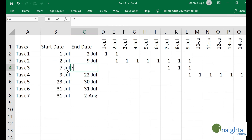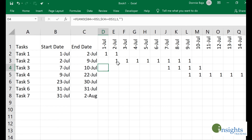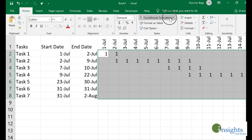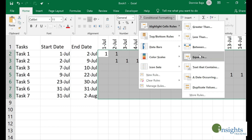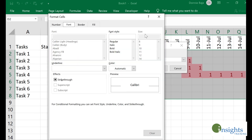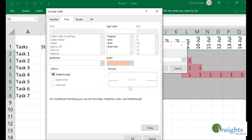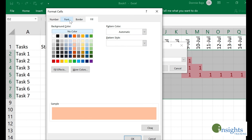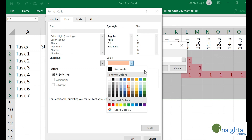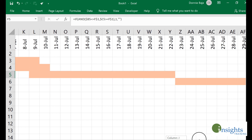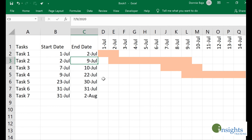Now we're ready to put colors into this Gantt chart using conditional formatting. I'll highlight these cells, go to Home, then Conditional Formatting, and highlight cells that are equal to 1. For the format, I'll choose a custom format because I want to make sure the font color is the same as the fill color I select for the cell — that way the number 1 won't be visible. I'll match the font color to the fill color, then click OK twice. Now the cells are formatted based on the start and end date.